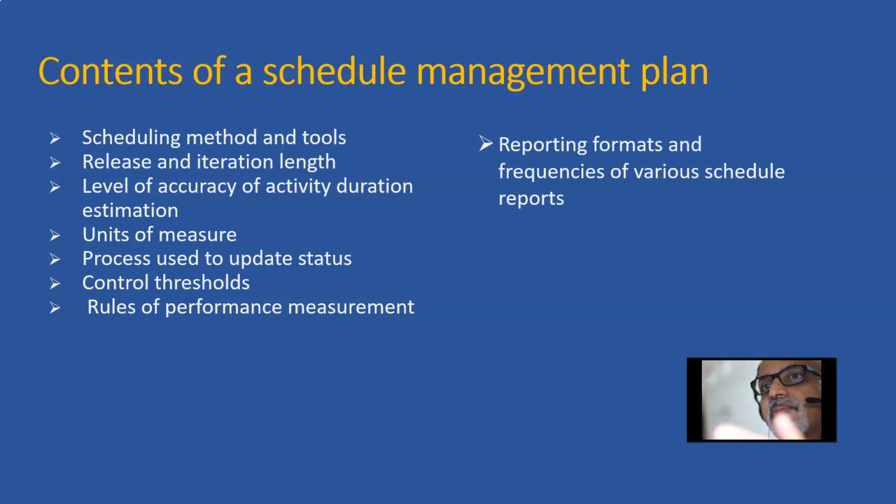So if nothing is provided, it can be just percentage completion based on the judgment of the person who is reporting it. Or it can be a quantity surveyor who literally measures the progress and then reports it back. So these things must be defined based on the nature of activity, and there should be common understanding across stakeholders who are performing that activity. Otherwise, your status updates will not be accurate.